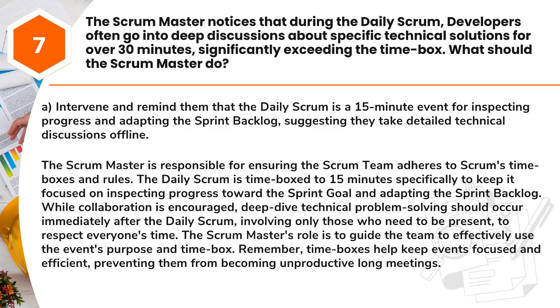While collaboration is encouraged, deep-dive technical problem-solving should occur immediately after the daily Scrum, involving only those who need to be present, to respect everyone's time. The Scrum Master's role is to guide the team to effectively use the event's purpose and timebox. Remember, timeboxes help keep events focused and efficient, preventing them from becoming unproductive long meetings.